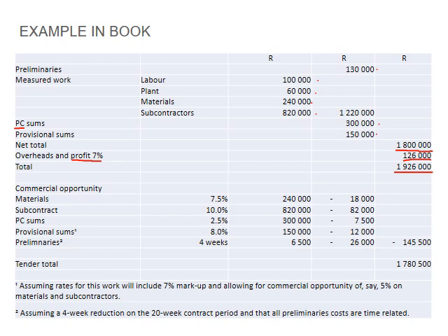But now if you go and look at it a little bit more in depth, you can actually see, okay, materials, I can maybe try and squeeze the suppliers and get off about 7.5% of material, so I've got a bit of a saving there. My subcontractors, I can negotiate, for instance, that they take some of the risk for their work insurances, etc., perhaps, or they need to buy the material, so you can squeeze them and get their cost lower to